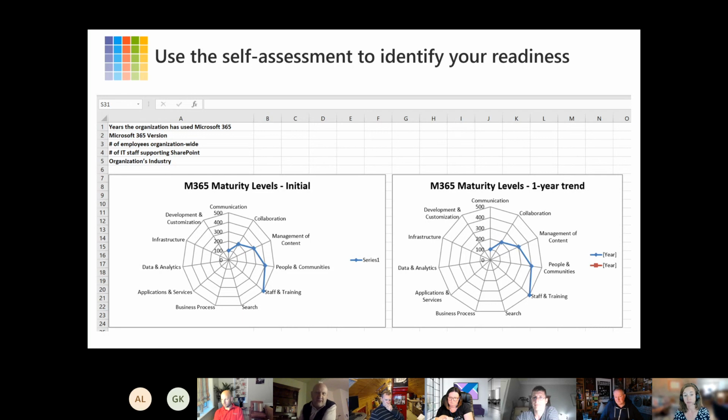Then the next step up is management, so they just need a check on what those people on the coalface are doing. And the people at the top, the most senior people, who are the directors, just need a traffic light system to say, right, is everything going to plan? And again, the whole maturity thing still fits into those phases as well. So to me, it's more role orientated than it is department, because every department has those three seniority levels.